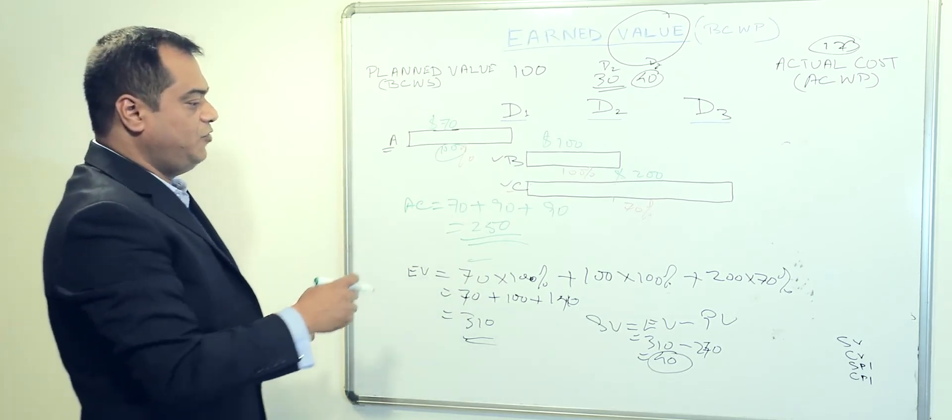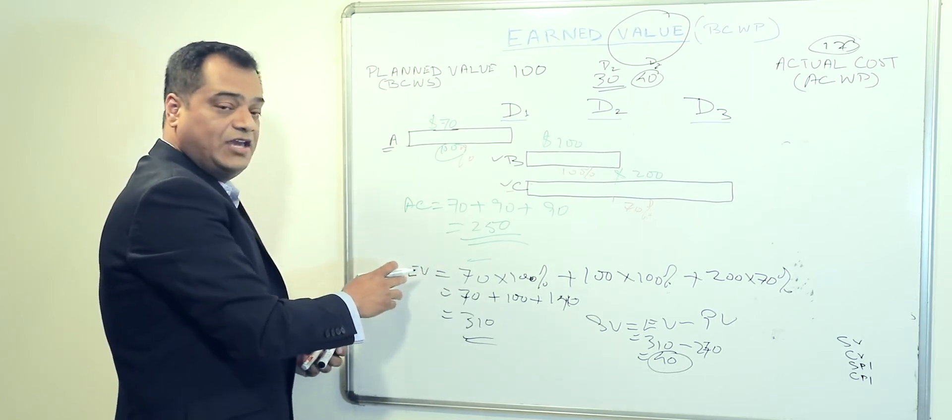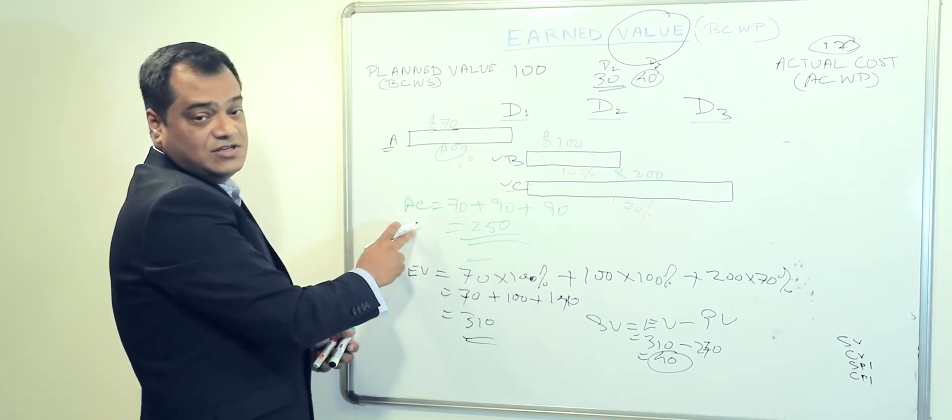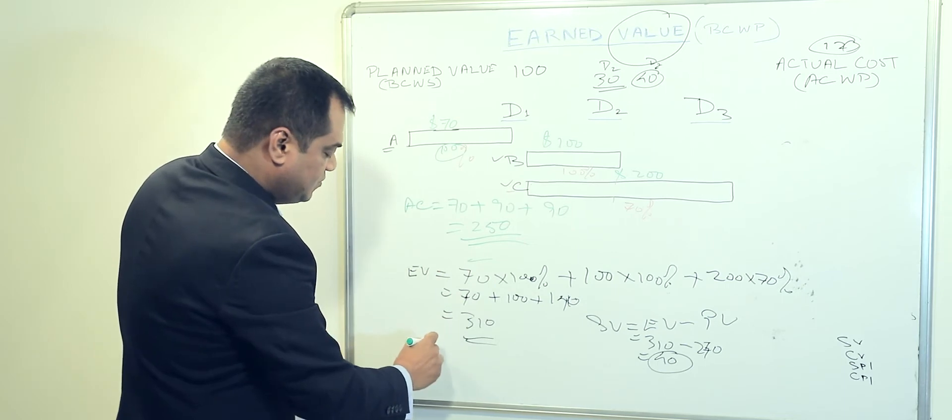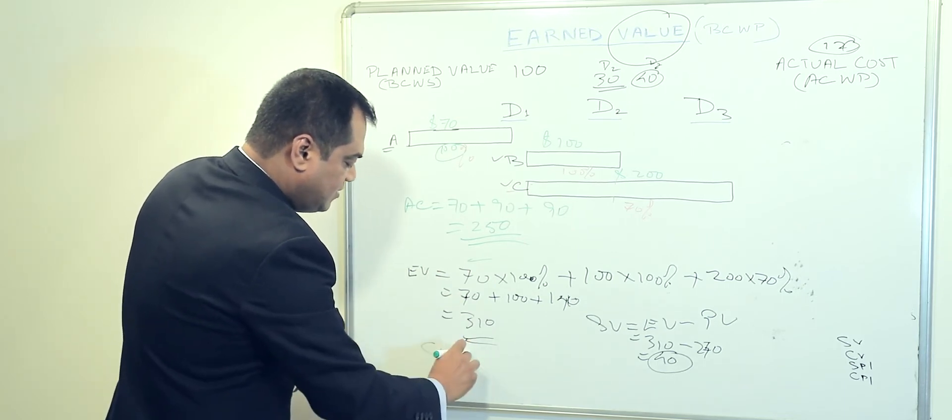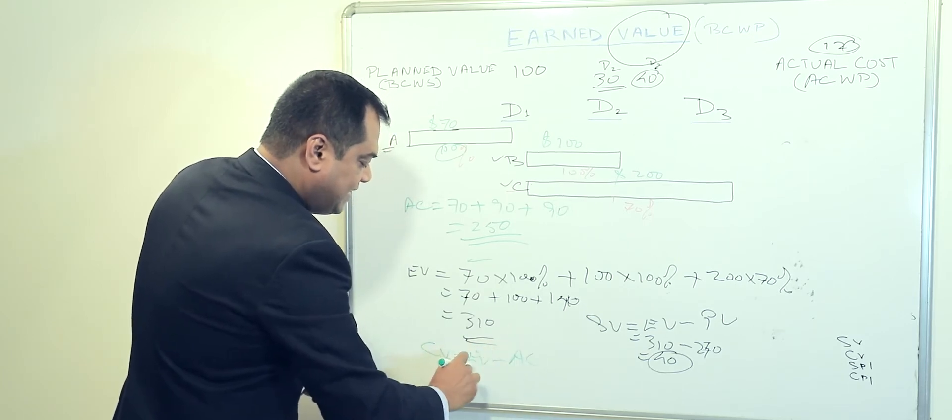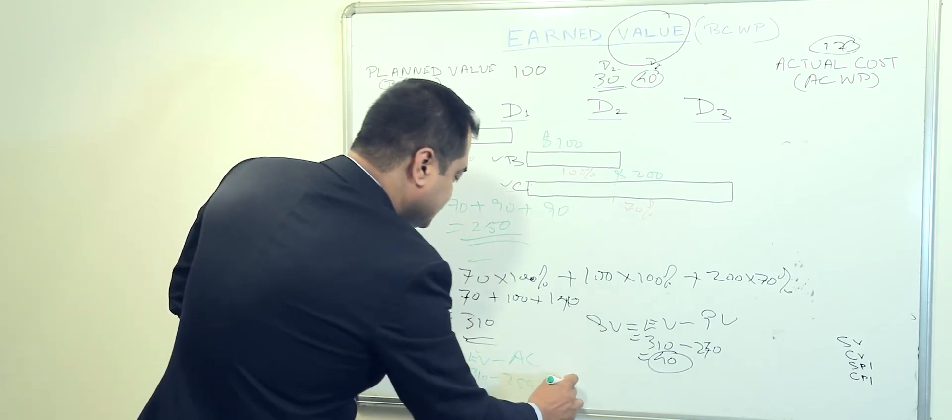Now if you want to see what is the cost variance, obviously you again want to measure what is your earned value minus the actual cost value. So now if you make the difference between the two, cost variance is earned value minus actual cost, and that makes it 310 minus 250. That is 60.